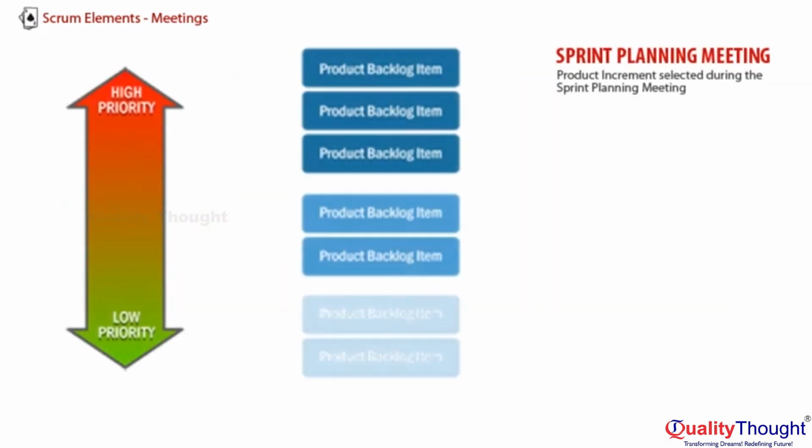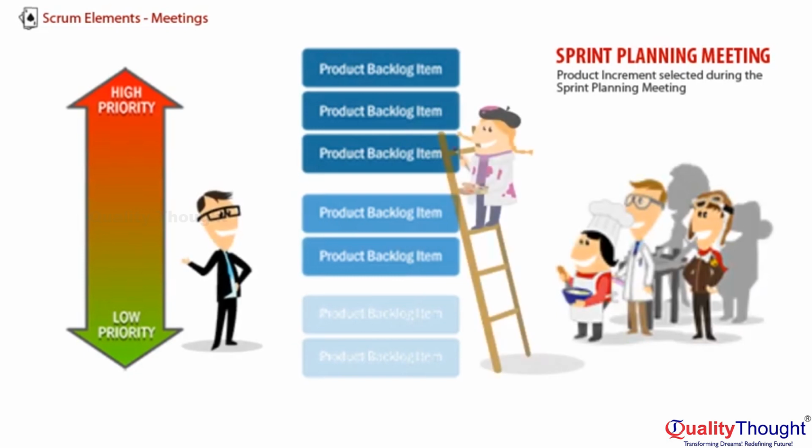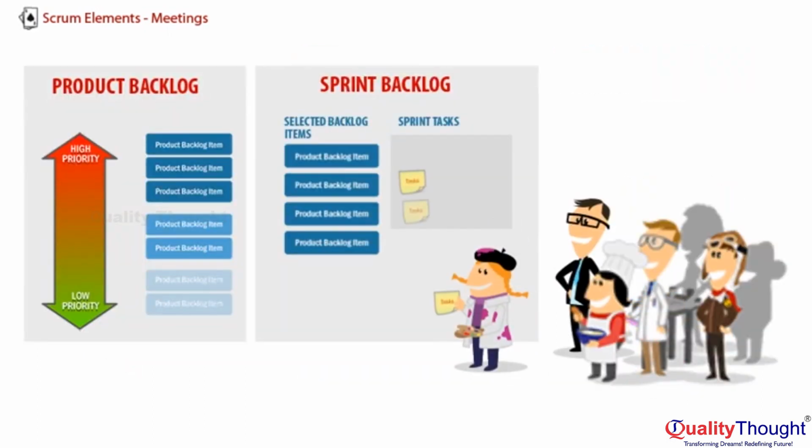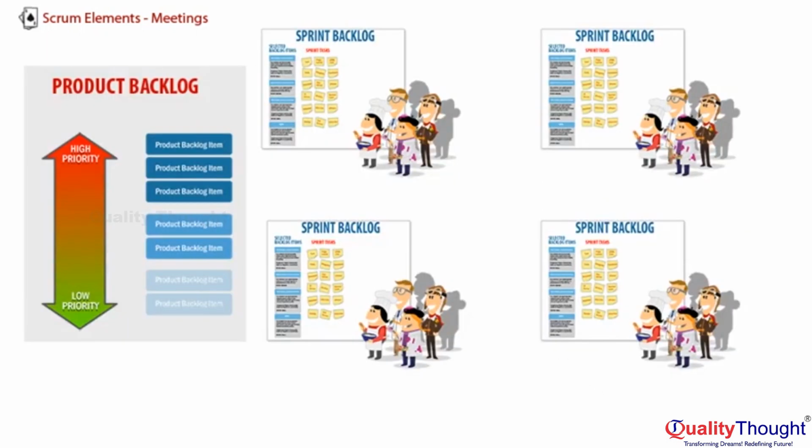I personally like to end the sprint on a Friday so we're not working over the weekend. At the planning meeting, the team and the product owner choose which items to attempt in the sprint. The team pulls selected items into the sprint backlog, plans how they will do them, and decides whether it's the right amount of work for them to do. They plan one sprint. In large-scale Scrum, multiple dev teams pull work from the same product backlog into multiple sprint backlogs. They plan to collaborate as a team of teams without intermediate coordinators.